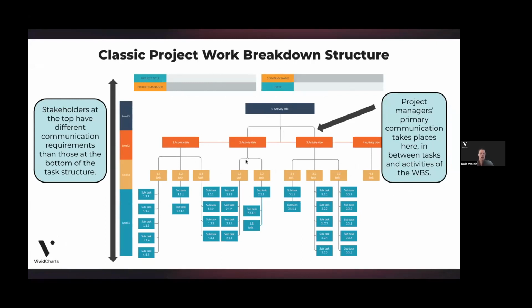So they're making sure that the task level details are not just getting done, but staying current from a data perspective in the ServiceNow platform or whatever platform you're using. And then making sure at the top level, they have a report out that communicates status updates to those stakeholders who don't necessarily need individual task level detail on everything, but they need a summarization, and that's the project status report.